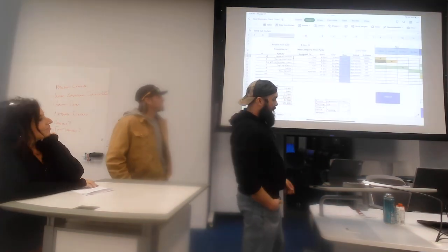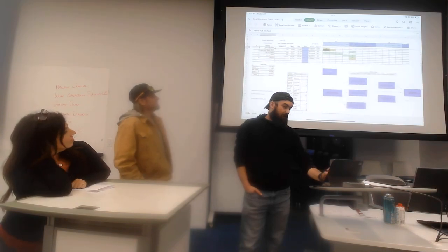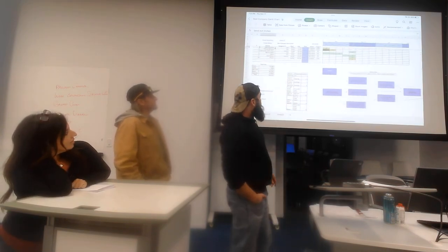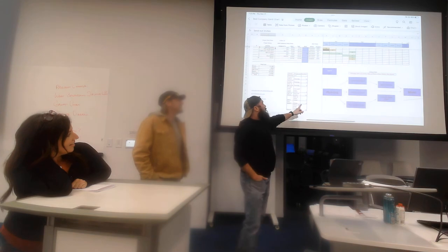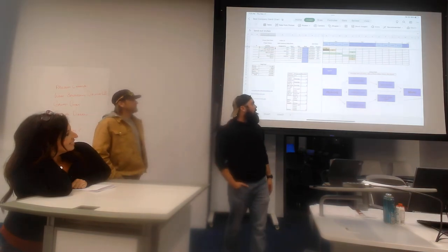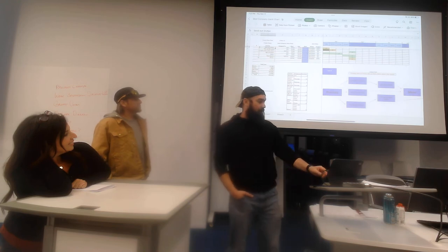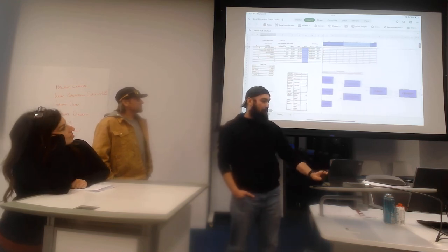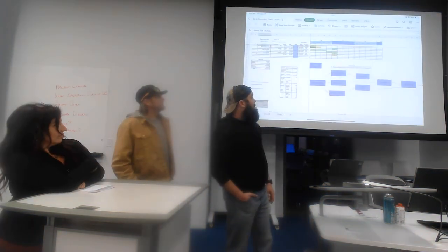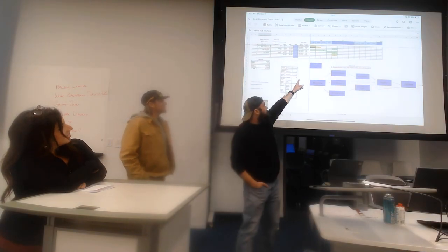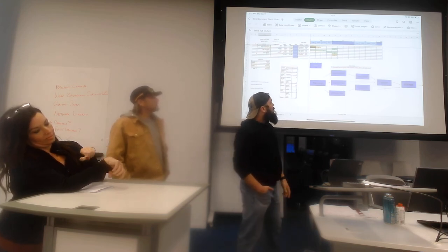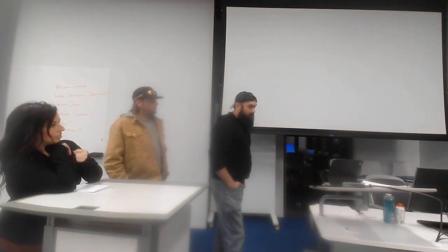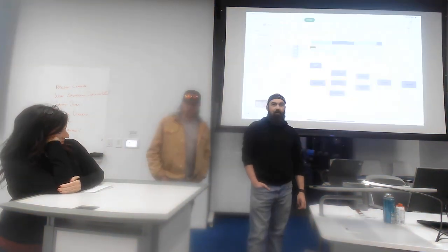All right, here we have our Gantt chart, among other things. We've got our network table here. And to the right, you've got the AON diagram and the critical path notated with the red arrow. You can see our legend here with forward, backward, the duration, and the slack in the center. Critical path: planning, send out invites, sign up sheet, menu, dinner, and give speech.